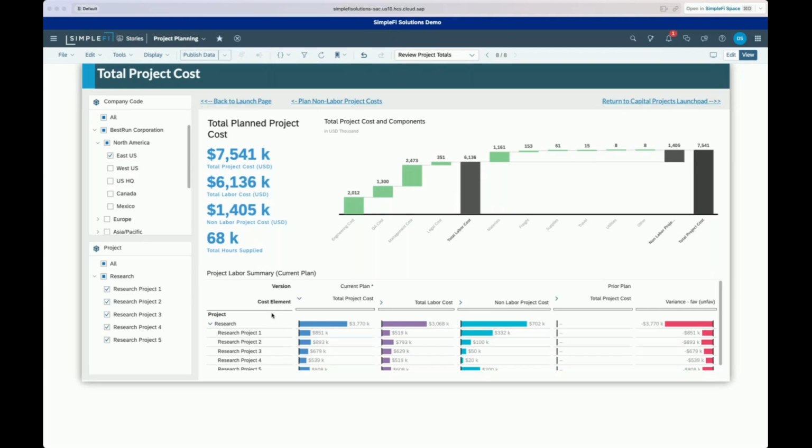So that really then takes you through that process: going through and taking your labor need, entering that need by the types of skill sets you need in this particular example, comparing that against what is available from your workforce management system or source system, costing that up for your particular project, adding the other non-labor costs to it, and arriving at total projected project costs.